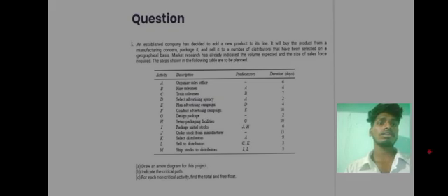A. Organize sales office, 6. B. Hire salesman, A, 4. C. Train salesman, A, 2. D. Select advertising agency, A, 2. E. Plan advertising campaign, D, 2. F. Conduct advertising campaign, E, 10. G. Design package, 2. H. Set up package facilities, G, 10. I. Package initial stocks, GH, 6. J. Order stocks to the manufacturing, 13. K. Select, A, 19. L. Select duration, CK, 3.